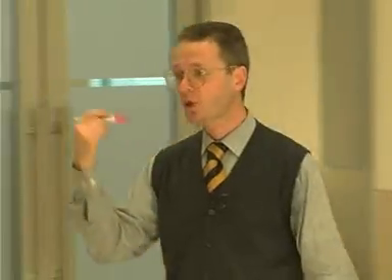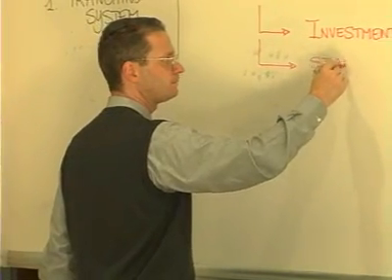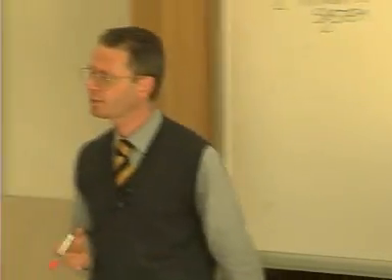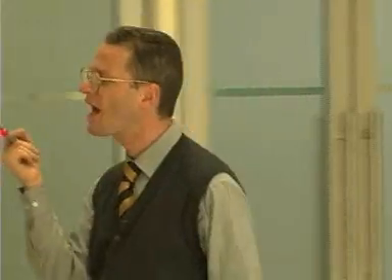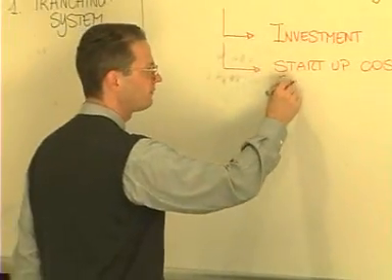and all the additional costs that this investment determines during construction, and so capitalized interest, fees paid to lawyers, technical advisors, fiscal advisors and financial advisors, and so the cost for the investment, the startup costs. Startup costs basically are represented by all the fees that have been paid by the special purpose vehicle to all the consultants that have helped sponsors to organize the deal. So startup costs, basically consulting costs.